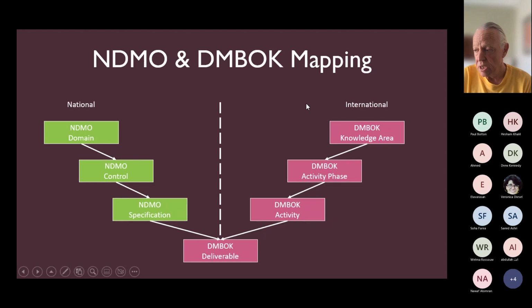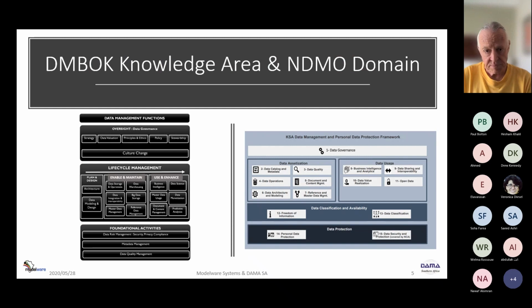Of course, my focus is DMBOK International. We all have lots of materials in terms of the knowledge area, the activity phase, the activity, and the DMBOK deliverable. I've got those in databases, and it was now saying, okay, I've got to this level, but I've now got to connect those specifications to a deliverable. Okay, that was not that easy. It took us, I think, in the region of about a month and a half to actually build all of these mappings and to recreate the folders.